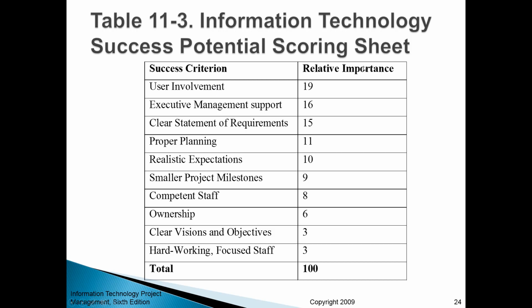Routinely, many studies, including the studies performed by the Standish Group, say that user involvement and executive support are the two most important factors. So a lot of risks come from these two areas. Failure to get users on board and get them involved in your project, to share their expectations and needs, can seriously jeopardize the chances of your project being completed, because if you don't get users involved, you may end up developing something that your users will never accept and will not use.